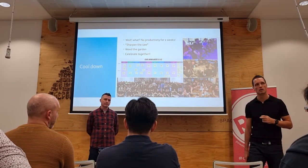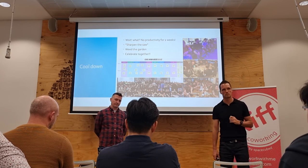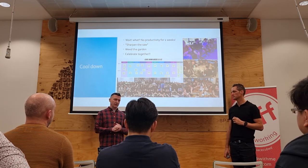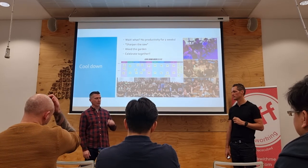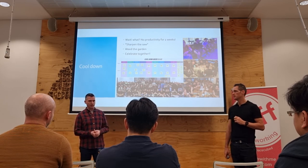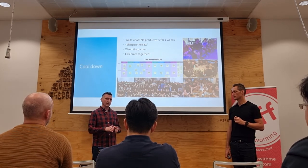Could you clarify the frequency or cadence around check-ins, and also what happens if the team does have to pivot because you've applied the handbrake? So fairly autonomous as to how often they check in. There's a rule of thumb: once a week there needs to be a scheduled check-in where Lee or I can walk in and look, and say cool, carry on. They can catch up every day, they can have their own human stand-up if they want. That's not dictated, but once a week is the sort of helping checking period.